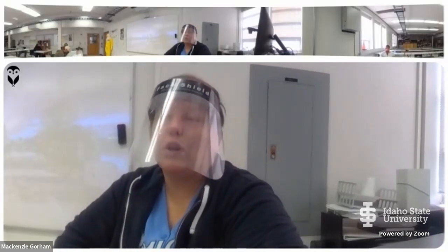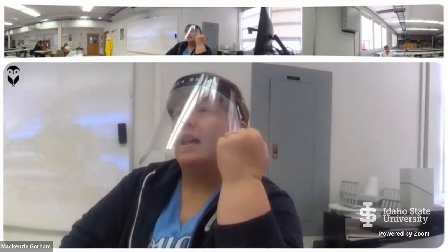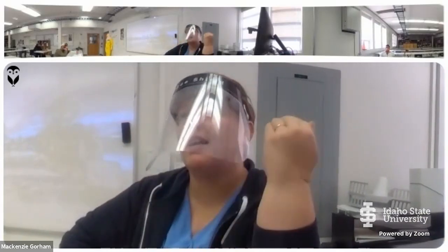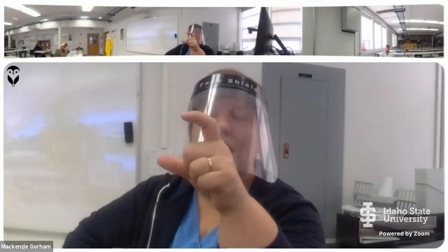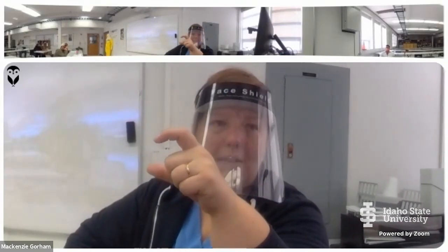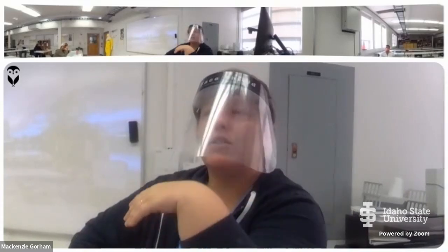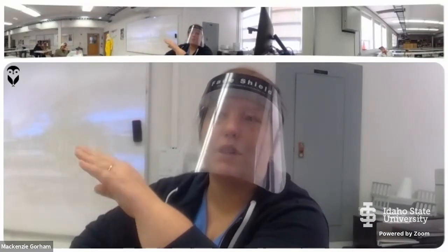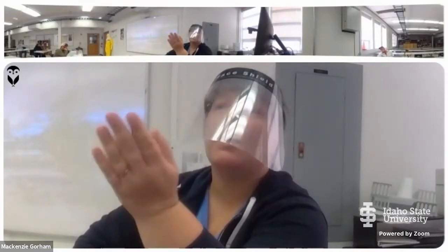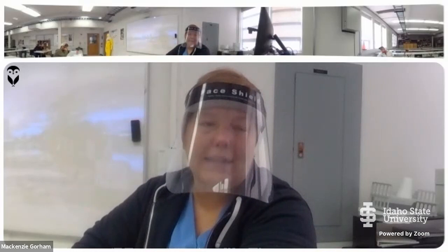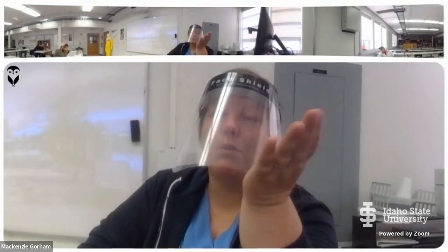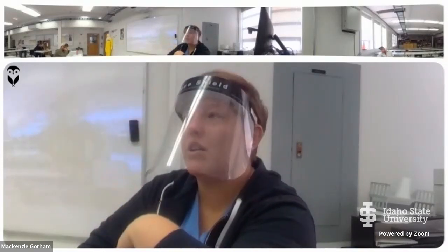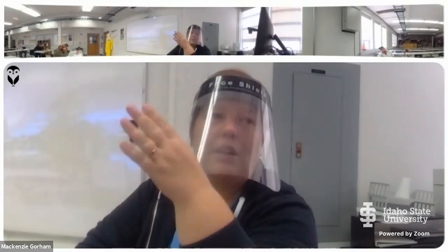And then just work control wise, especially on outages, you might need employees to be able to get a very large percentage of their dose limit on a particular task. And so if you have 2 employees who have gotten no dose because they didn't have to go in and do verification on another job, they can go in and perform that needed task. Instead of, if everyone has a little bit, you're going to have to break it up and send one group in and they're going to do part of the work, and you're going to stop and send another group in, right?